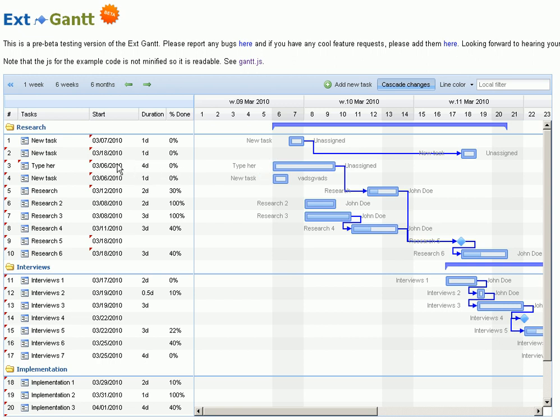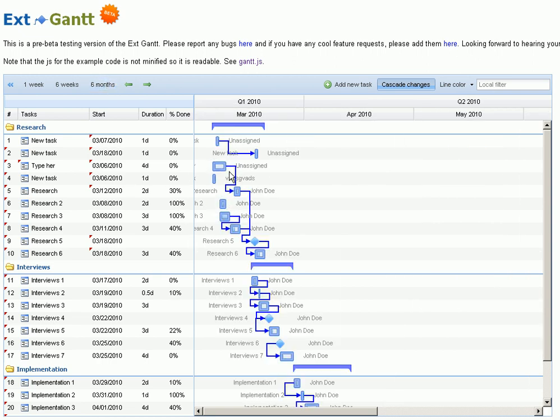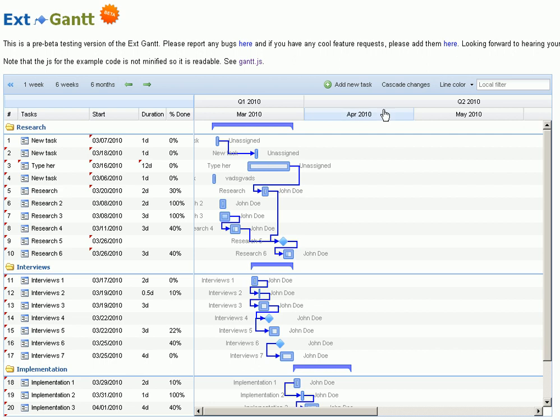And also, if you have a long chain of these dependencies, you might want to know beforehand which tasks are going to be affected if I change these. As you can see, if I click on either of these fields that affect the time, you can see that the path is actually outlined in red all the way through. So when I change this to 2, all of those highlighted fields are updated instantaneously, and I make it 12, and everything moves as you would expect it to. And then you can of course turn it off again. It's just a toggle.